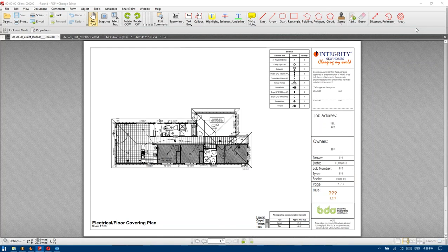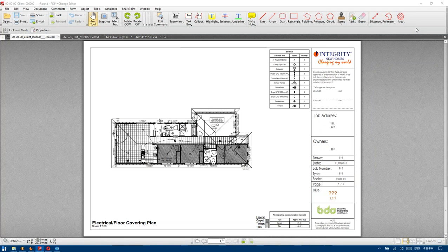At that point in time it's navigating that. The specification just talks about the gutter complying with the BCA — it doesn't provide any dimensions or anything more than that. It's pretty general. So that probably needs working too, because that there would imply that we have to comply with this condition. And if the engineer or this code dictates we've got to go up in size, then we'd be liable for that versus being able to charge. So we may have to review the general sense of that clause and be a little bit more specific in exactly what's been provided.